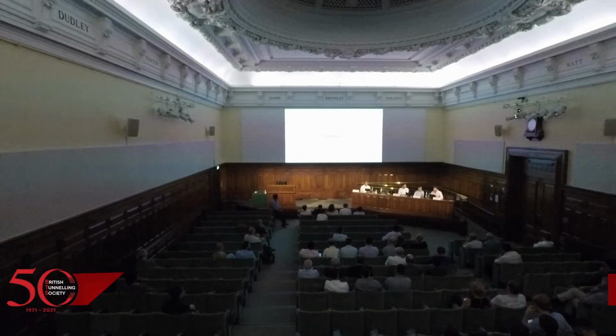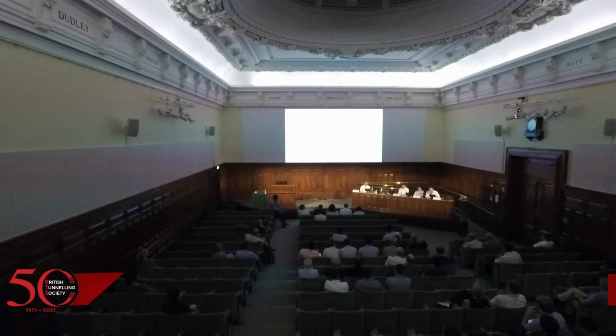As I told you, we managed to avoid the probing in Falconbrook, that is in the west part of Tideway Central. The axis level was above 60, it was 63.5, so it was in London clay. There were no sand channels in that section. So we were pretty much clear that there were no sand channels, and we got an assessment by our designer, ACOM. We provided all the information, and we got into that situation. Thank you.